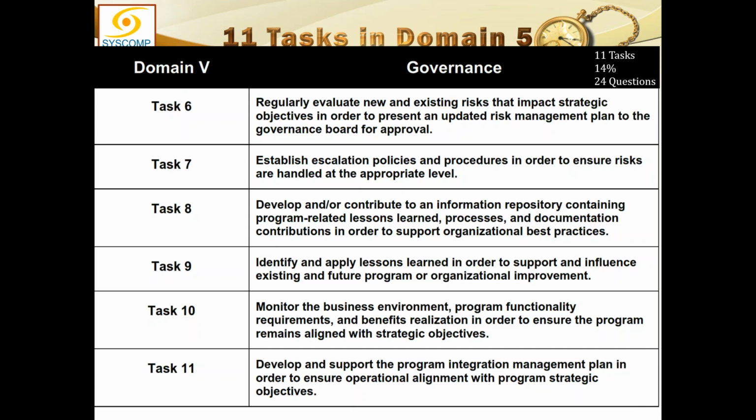Task 10: monitor the business environment, program functionality, requirements, and benefit realization in order to ensure the program remains aligned with the strategic objectives. That is your ongoing goal. You will keep confirming that your program is still in alignment with the strategic objective. As soon as you find it is not, then you lose the business case, and therefore the need for the program may not be there anymore, and the portfolio may decide to close down your program.